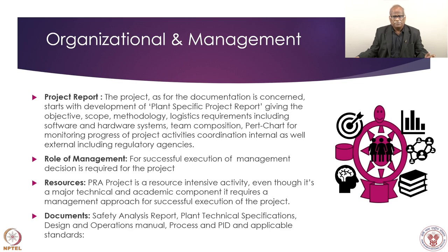So my experience is that before starting a project, an expert in that field or a couple of people should develop a project report. Why a project report? When we develop it, we define the scope, objective, resources required, what the final report should be, and what tools and methods are required. Once we bring out all those things in the project report, it becomes easier to deal with the management: what you want to do or what management wants us to do, what manpower and expertise are required, and what software is required. If these things are straightened out in the beginning, and of course the results that are expected,